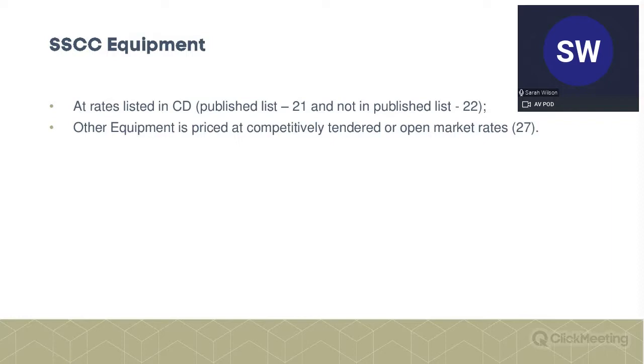We saw before when we were dealing with people that that was number 1, starting with sections 11, 12, 13. We're on to equipment now, which is number 2, so the first item is 21. Basically, what you get paid for equipment, for your cranes etc., is based on any rates listed in the contract data part 2 or any published lists that are referred to.